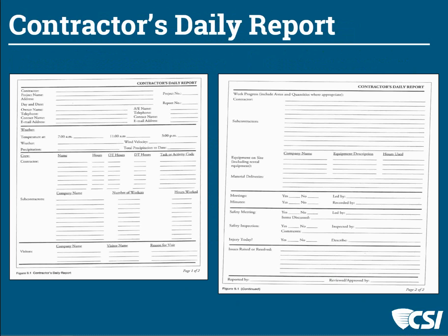Well, you can't fill this out on Friday before you go home when you're in a hurry to leave the site. These are things that need to be happening on a daily basis, and something that you will want to see your superintendent or foreman on the job doing. So I try to, at my weekly visit, take a look at these and just say, hey, can you show me what went on this week? I'm just curious. Maybe I missed something. I'd like to sit down and look at your daily reports.